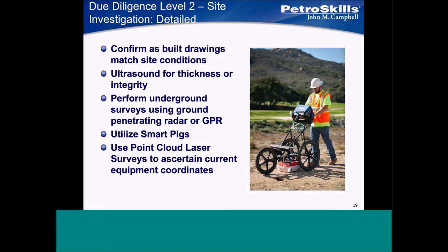Ultrasound for thickness testing or integrity. Ground penetrating radar — you see a gentleman pushing something that looks like a fancy lawnmower, but that's a GPR unit. Smart pigs. Point cloud laser surveys. Some of my clients have done point cloud laser surveys on their entire facilities — refineries or petrochemical units here in the U.S. — so they know the XYZ coordinates for everything. This is pretty inexpensive now.